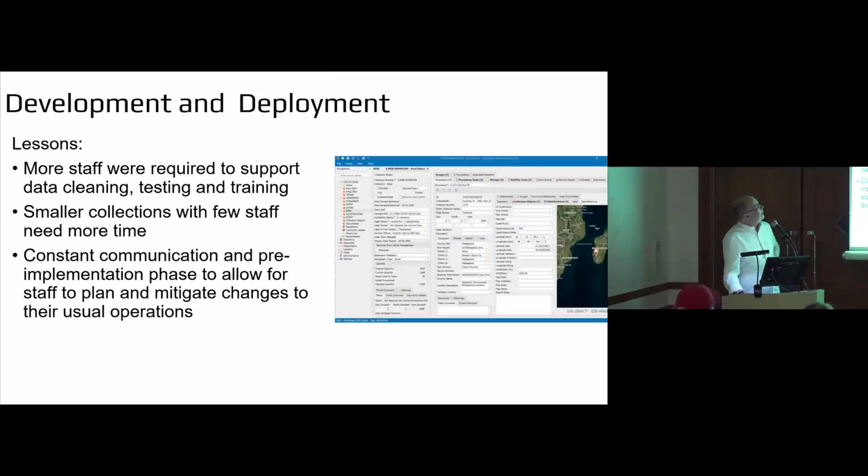So, beginning of lessons. I think we probably initially underestimated the amount of data cleaning that had to be done, and the testing and the training. And bear in mind, for a lot of people it's the first time they've ever tested, and that's a complete change for them. It takes time. It's more impactful in smaller collections, because if you've got a big team, you can spread the load about. If you've only got 3 curators in a particular collection, that's quite heavy on them. So that takes longer than you think it's going to take in the smaller collections.